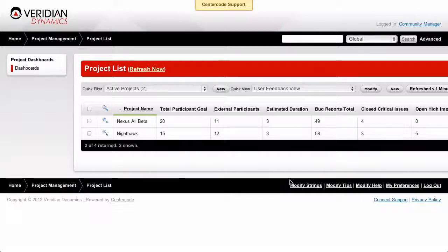So as you can see, project dashboards in combination with project profiles and cross-project labels can be extremely effective in comparing projects across a very large community. You can pull up whatever data you want as long as it has a cross-project label assigned to it. In these cases, regarding cross-project labels, you definitely want to assign those items within your template so that whenever you create a new project off of that template, they're already assigned. You don't have to go back in and reassign them to different items within each project.